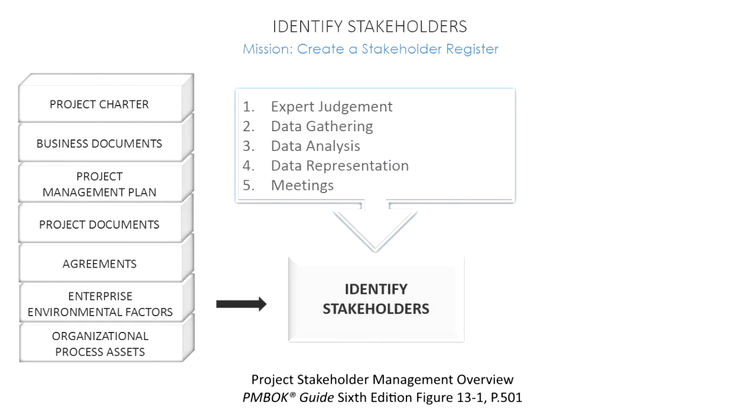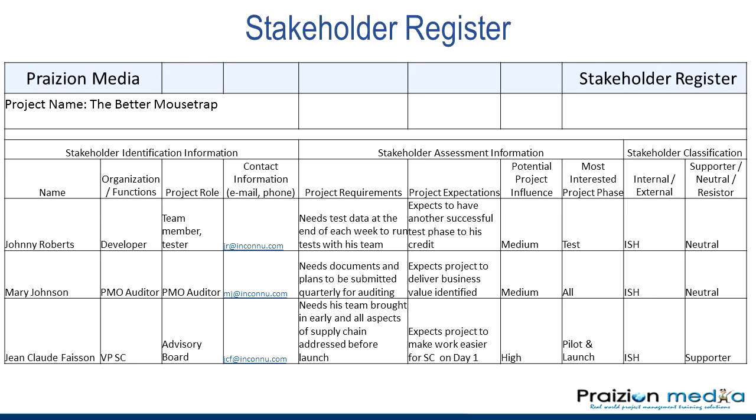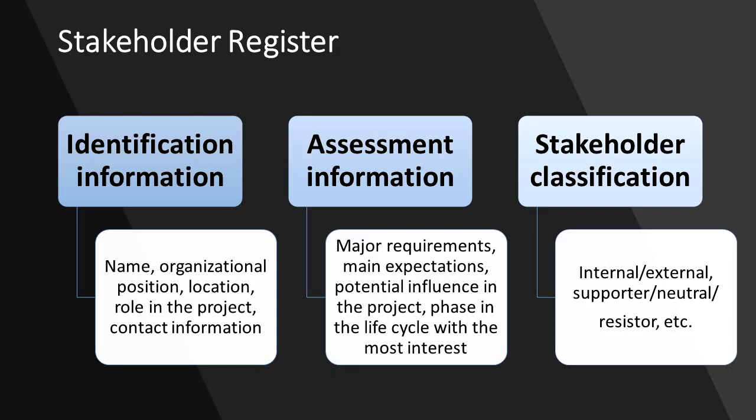Let's talk about our outputs. Big output, stakeholder register. The stakeholder register contains identification information of stakeholders, assessment information of stakeholders, and stakeholder classification.